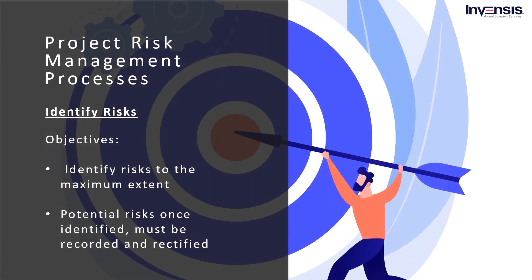Now let's move on to the second risk management process: identify risks. The main reason for risk identification is to identify risks to the maximum extent possible. Some risks are unknowable, requiring the identify risk process to be iterative — you can repeat the identify risks process to find new risks that can occur over time. This process should be recorded and considered for appropriate action. Where responses are not implemented immediately, these should be considered during the plan risk responses process.